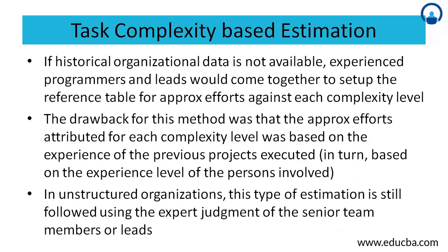If historical organizational data is not available, then experienced programmers and leads would come together to set up the reference table for approximate efforts against each complexity level. Let's say an organization was starting for the first time. They know how to go ahead and do estimation by this method, but they don't have a reference point to say what effort to attribute to a small, medium, or high complexity task.